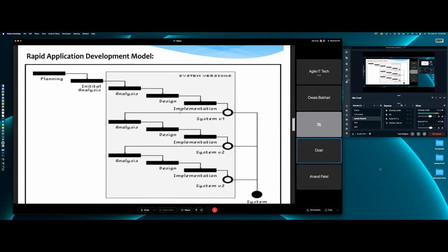But who cannot be delayed? Definitely not team number two, and definitely not team number one. I need to make sure one and two are delivering on time so that the integration begins on time. Just like our house, if we were getting all the components built by different teams, what is the very first team that I've got to make sure delivers on time?